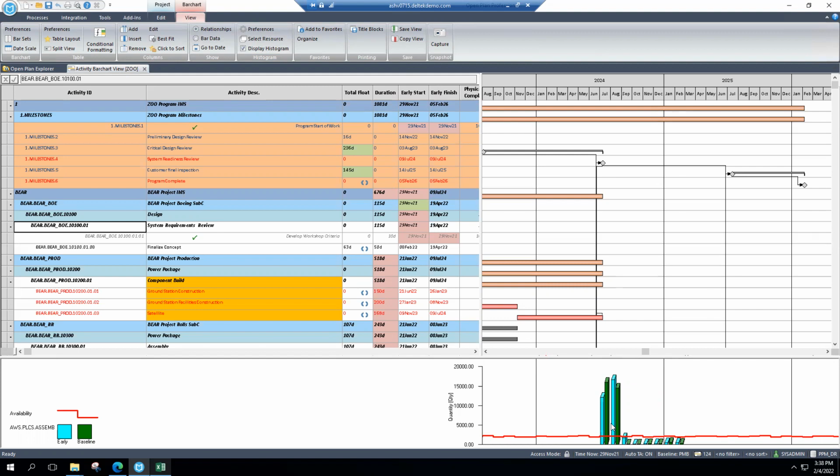The individual groups who might be managing their own pieces of the project have scheduled what they think they need, but maybe haven't taken into account what other people have also scheduled. And so now I know in 2024, they've scheduled more folks than I have available to use. In that case, then I have some time.